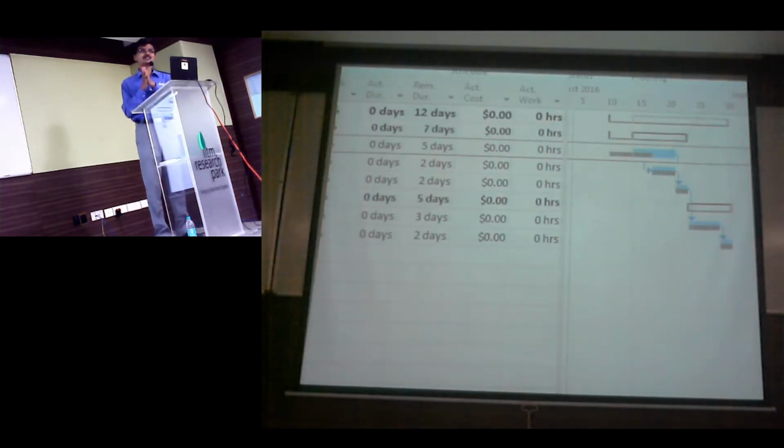My recommendation is whether your plan is at a high level or detail level, always go for forward scheduling. I know you will not be happy about this option because the finish date is estimated by the project. If the finish date is estimated by the project, always look at options to optimize this plan. We are already aware of 2 techniques, fast tracking and crashing. You can always start applying them on your critical path to optimize your project plan.